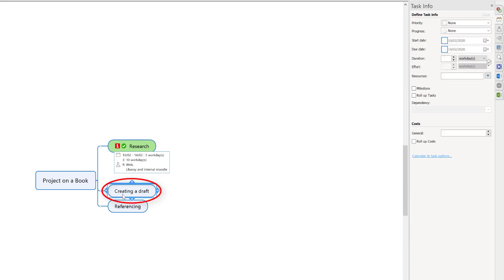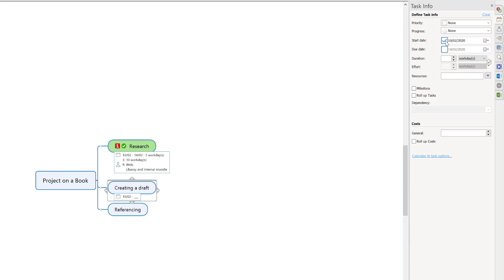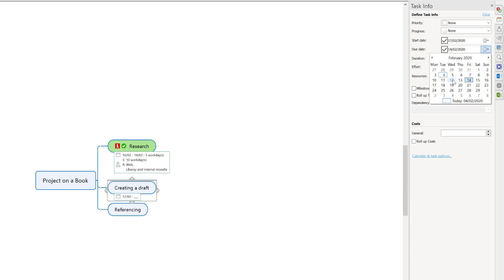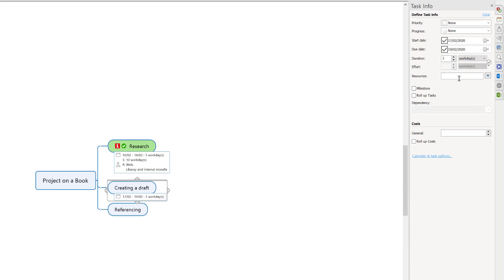Again, I'm going to create a draft. Come up to the top. This time I've got to do my research before I can create a draft, so this is going to have to be the following week, the 17th. How long am I going to spend doing the draft? You might decide I'm just going to spend 2 or 3 days. Then resources again - to do your draft you might just use Word.